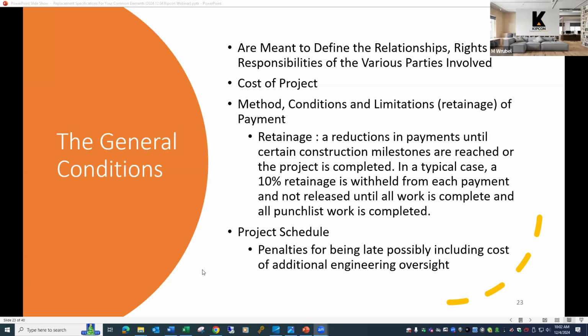In the case of a very large phased pavement project, say being done in 3 phases over 3 years, it's typical to structure payments in terms of when that phase is completed, and the contractor will submit an invoice for work completed with any extras.